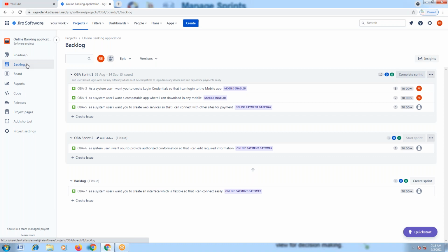No changes to an existing user story are allowed in the sprint once it has started. If the sprint has not started, you can make as many changes as you want. But once the sprint has started, you are not authorized or allowed to make any changes in the existing sprint. Point to be noted, this is point number one, which we have to be very clear about, right? No changes are allowed on the sprint. This is one.